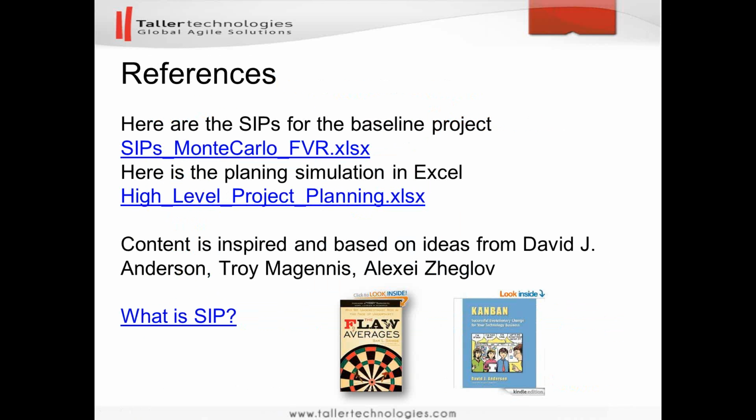Usually, if the team structure has changed, the distribution or the SIP packet should be invalidated. But again, it depends on the context. We might replace a team member with an even better technician or a better communicator. So it's up to us to decide if the distribution is invalidated. It's on a case by case basis.